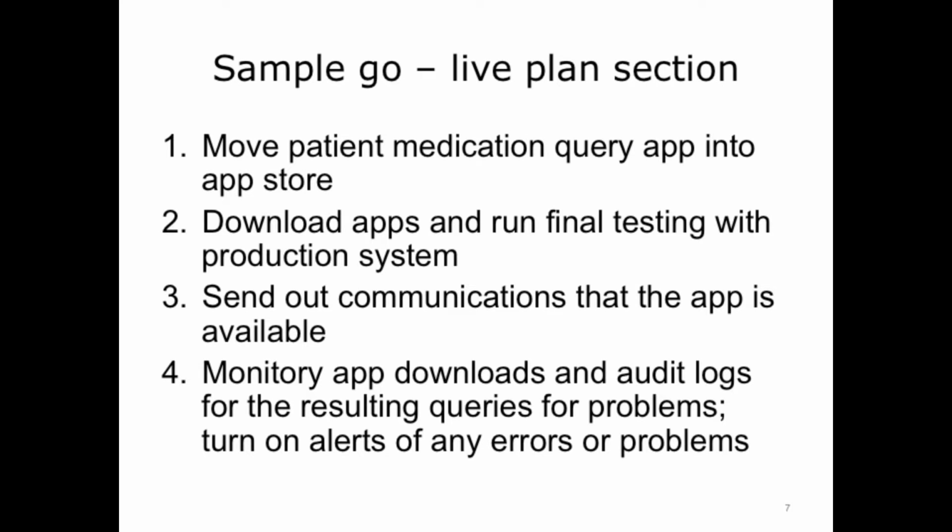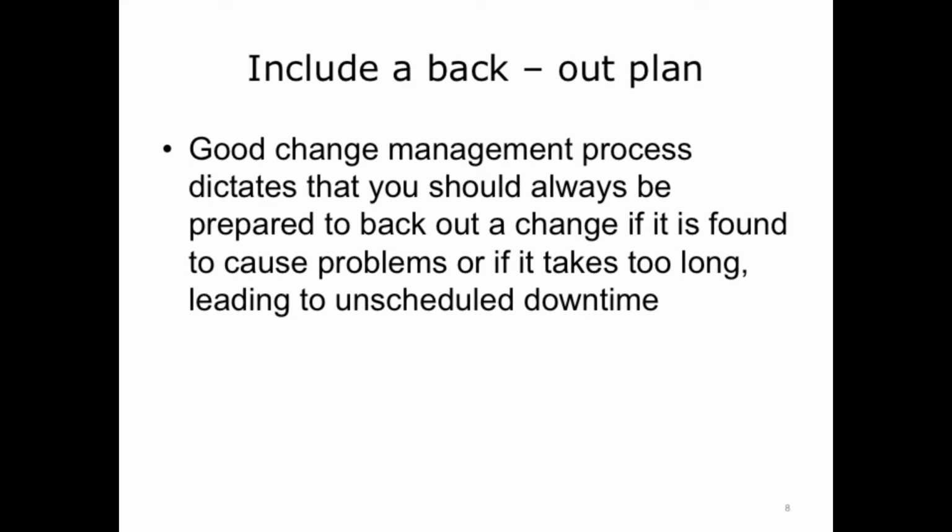This sample go-live plan is for a patient-facing medication query application. Note that it includes technical steps as well as communication steps. Good change management process dictates that you should always be prepared to back out of a change if it is found to cause problems or if it takes too long, leading to unscheduled downtime.